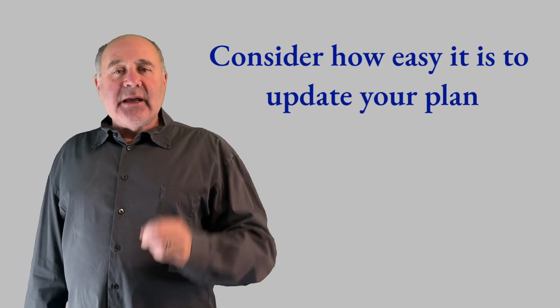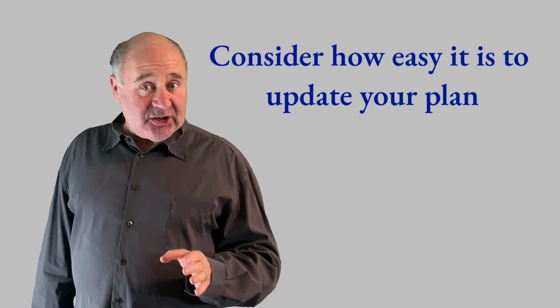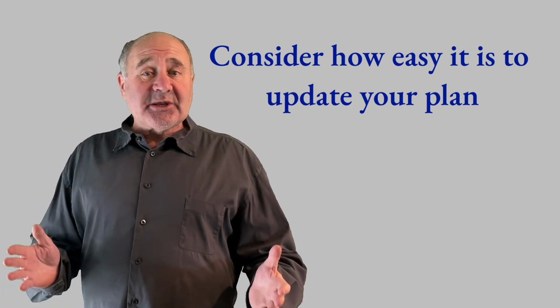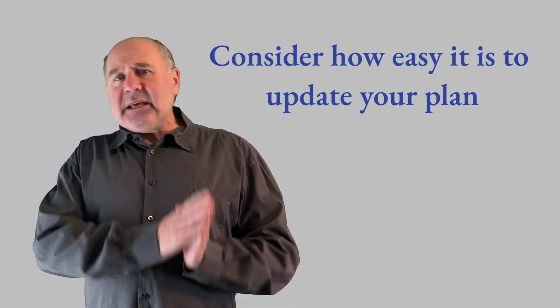Another thing to look at is how the platform deals with change. What if a task takes longer than expected, or one of the risks becomes an issue? How easily can you update the plan? In some platforms, you'll need to manually move everything, while in others you can just change a few things and the platform will recalculate the entire plan given the information you've already uploaded. For an adaptive project, one expects to be making changes like this much more often than for waterfall projects, so how easy it is to manage these changes is important.